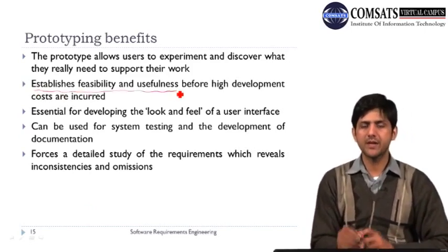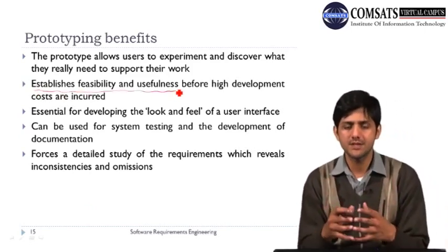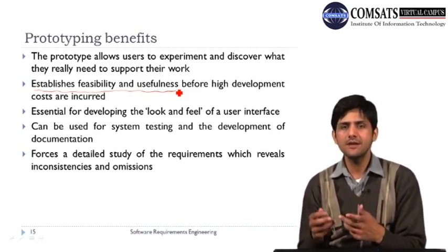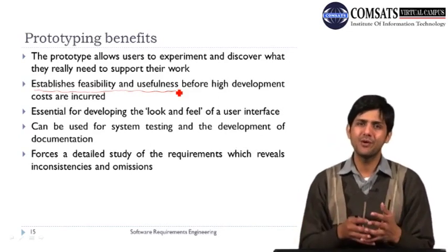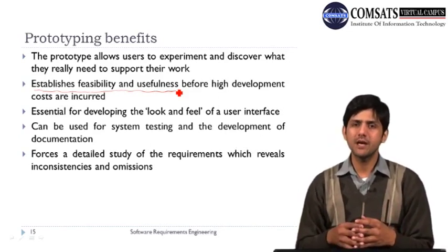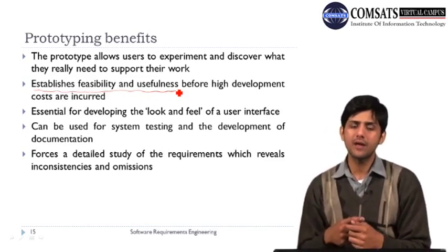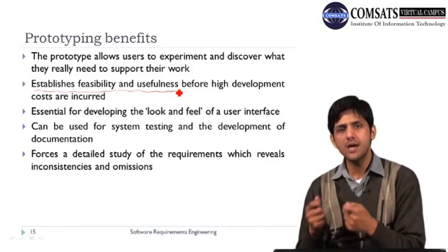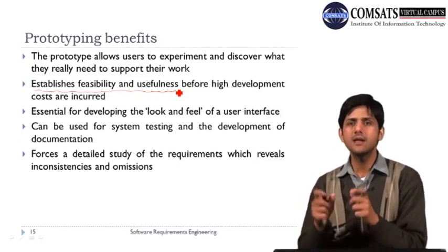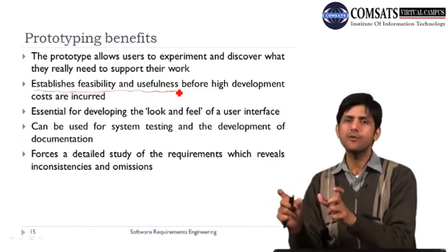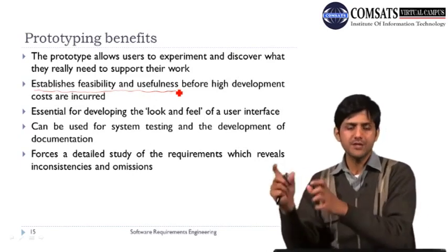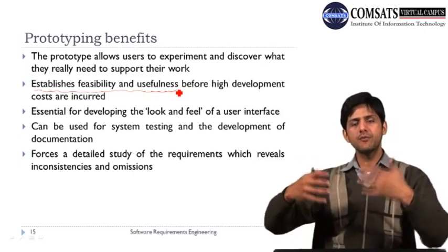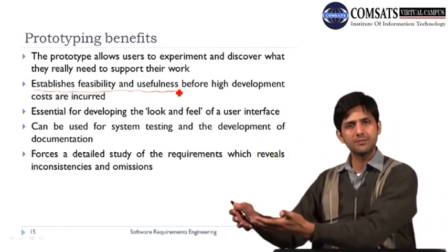Normally, in agile development, it is suggested that you do quick prototyping of certain features where something new is suggested which you have not done before. You just want to check whether this is feasible for you to do or not, so you do a very quick prototype just to gauge whether this can be done in the budget that is being suggested, or in the time suggested for this particular increment, because you want to have a very clear picture before you jump into something.